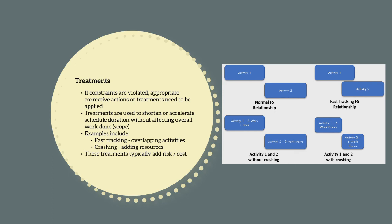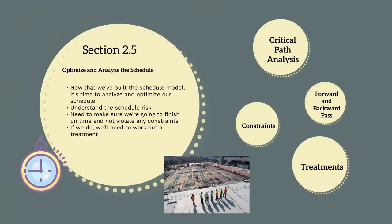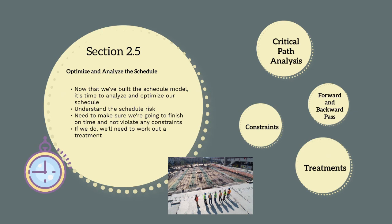Crashing is different to fast tracking. During crashing you still wait for activity 1 to finish before activity 2 begins; however you increase the amount of resources to reduce the time taken to complete the activities. For example, to construct a trench faster you might use six work crews instead of three. Crashing typically increases cost, as you need more resources that require more supervision and will likely not work as efficiently and effectively as fewer resources. So basically this gives us an overview of how to identify the project critical path, analyse the schedule, confirm constraints haven't been violated, and explore options to shorten project duration if required.